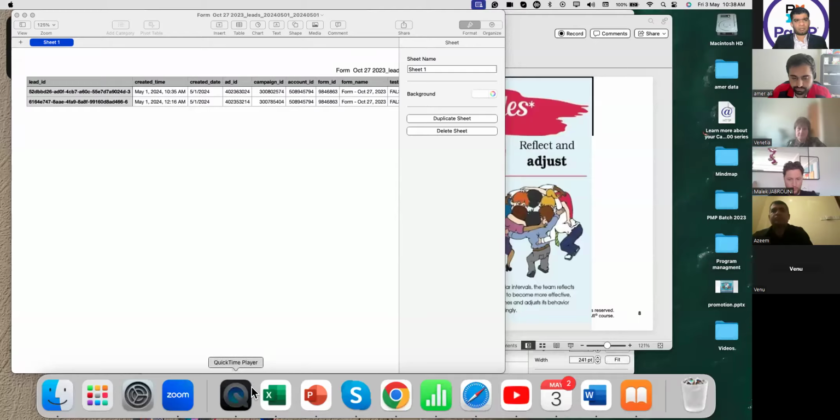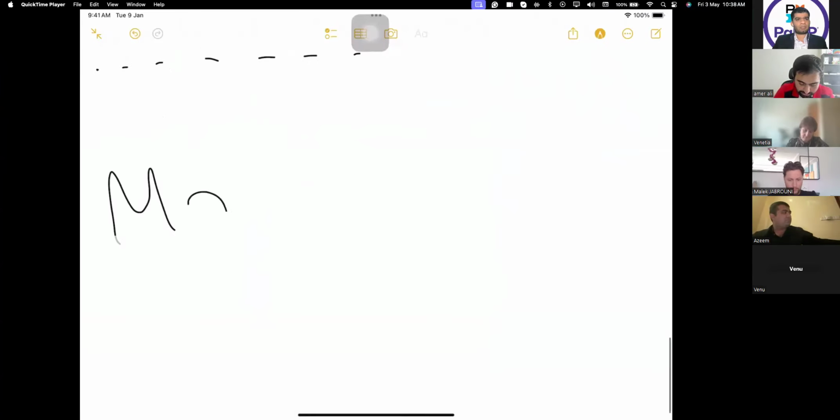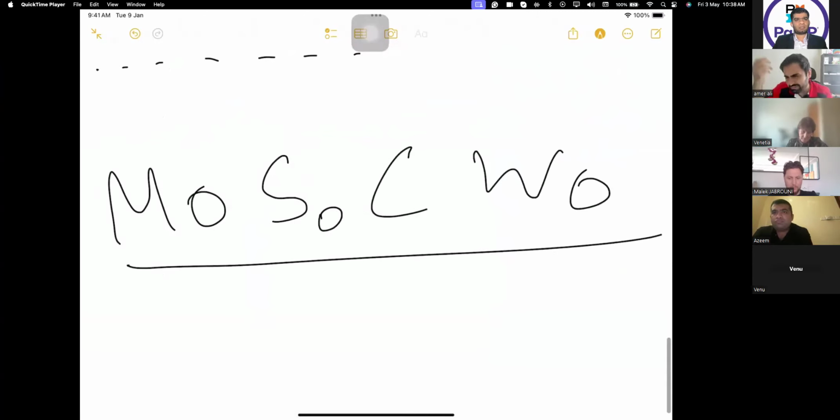We love to use a technique that is called MoSCoW. Must have, should have, could have, would like to have but maybe next time. There are multiple techniques that can be used for prioritization, but the most used technique is MoSCoW. Let's list down what are the most important features.